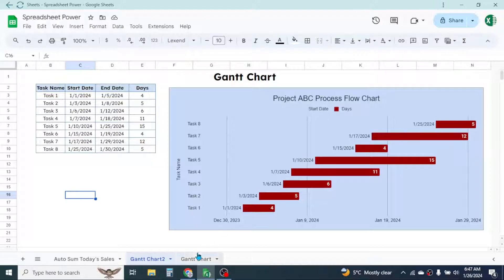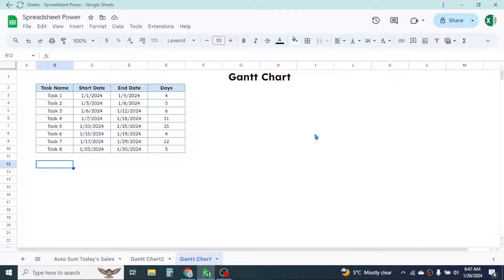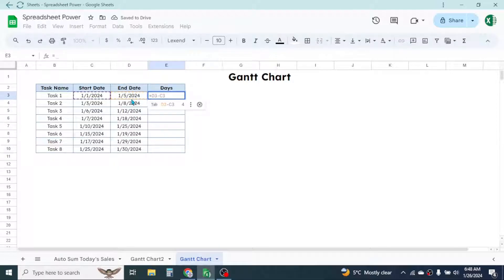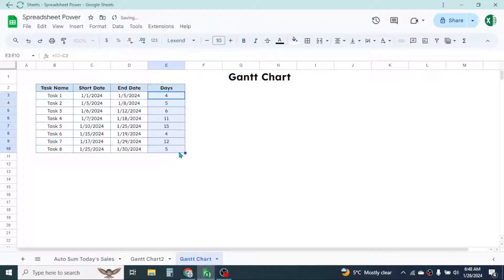Let's go to another sheet and start creating the Gantt chart. First of all, we need to create a table which has the task name, start date, and end date. By subtracting the start date from the end date, we get the days taken, which we can calculate by pressing equals, then this date minus this date. Press Enter and you'll get the days. Use the fill handle and drag it down to get the days for all rows.